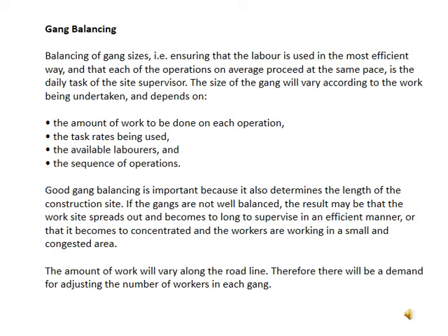The amount of work varies along the road line. Therefore, there will be a demand for adjusting the amount of workers in each gang. So depending on the amount of work, adjusting the number of workers in each gang is also required of the site supervisor.